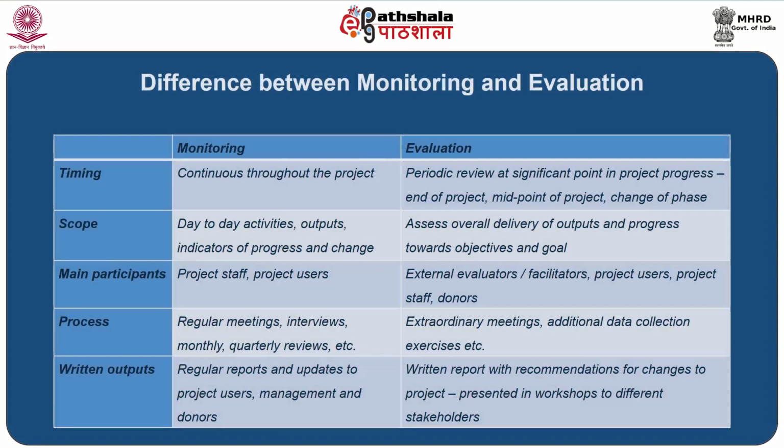Now let us look at the differences between monitoring and evaluation. We will look at monitoring and evaluation differences based on a few parameters like timing, scope, main participants, etc. Based on timing, monitoring is a continuous process where it is conducted throughout the project. However, evaluation is a periodic review which is conducted at significant points in time to assess the progress of the project, usually towards the end of the project or the mid-project, and to assess changes in various phases.